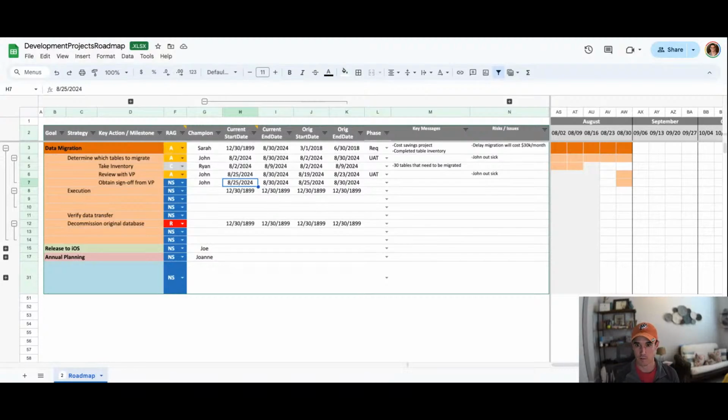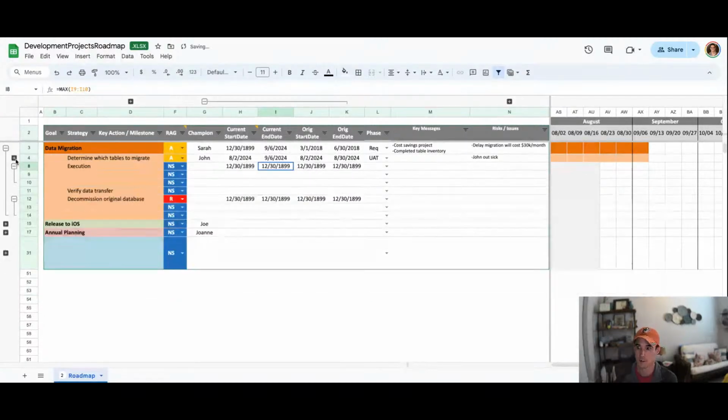So what we might want to do is actually write a formula that says we know that this subsequent process is going to take at least another 5 days after the above thing is completed. And this activity is going to take an extra two, the total activity. This is very similar to Microsoft Project, for example, right? Now we can see this cascading effect happening in real time, the overall milestone of the project extending out the entire length of time here, and then the overall project length also extending out.